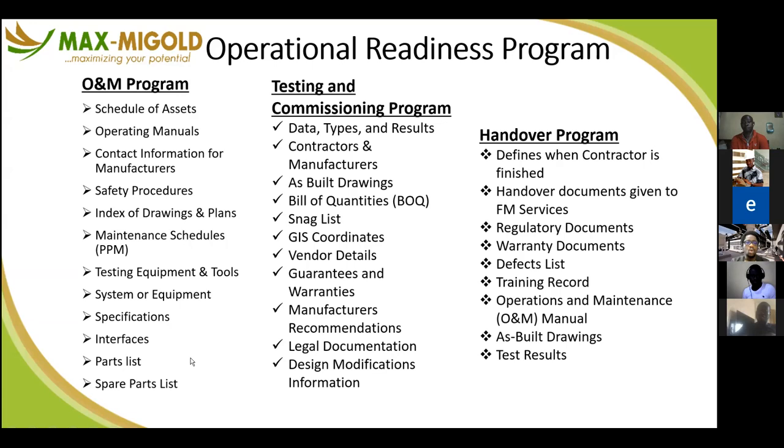Number two, your operating manuals for all that was built into that facility. I'm not just talking about the manuals that come with your AC or elevator engine, no. I'm talking of operating manuals that interpret details of how lines were run, electricity were run, drains were run, both drawings and descriptions, including how they should be maintained and operated. It should actually come from the construction process.